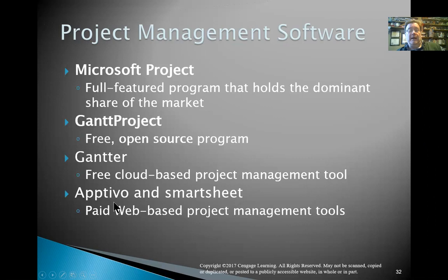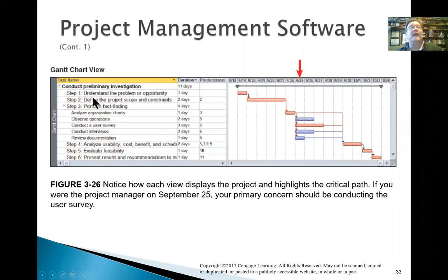And so this is sort of an example. And I don't know what product this is. This is now actually complete. So note the red tasks. They are red because that is the critical path. And you can see even graphically that if any one of these things changes durations, the length of the project would change. These blue ones, they could change, but as long as they don't exceed what's on the critical path, they're not on the critical path. I'll say this, that if this task here ended up becoming longer, then that would become the critical path and this one would fall off the critical path.